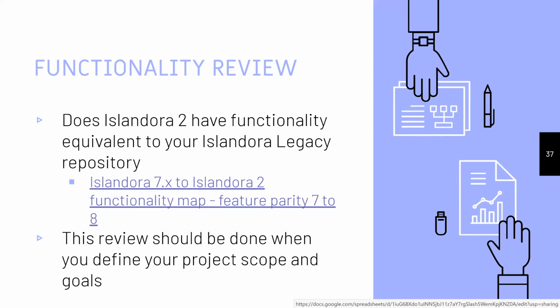And because it is possible you will identify things that are not ready in Islandora 2, that should feed back to your project scope and goals and timelines. So if you absolutely need something in Islandora 2 that is not yet production ready, you need to decide if you're going to pay for it, basically pay a service provider to deliver it as part of your migration, hopefully to give back to the rest of the Islandora community.